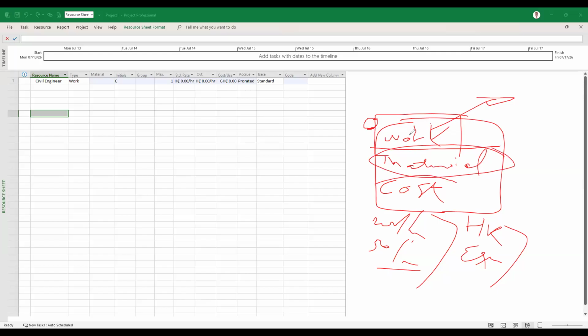And then cost resources are one-time cost events. So you subcontracted a job to someone and the person charged you maybe 20,000 for the work. It's called cost. For example, maybe you are working on a project and someone is coming to lay the paving, or do a particular thing, and you are not the one managing it directly. You are outsourcing it. That particular aspect, we treat it as cost. So when it gets to that activity, you assign the cost. We will look at that when we come to cost. So I wanted to explain maximum units here.